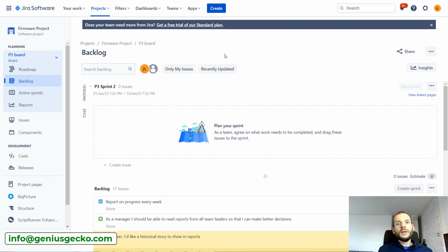They say which tasks from the backlog they will pick up into the sprint, then they have this period of time to deliver this work. Everything that is delivered is ready, and things that they were not able to deliver get back to the backlog, and another sprint is planned. So basically the process repeats.